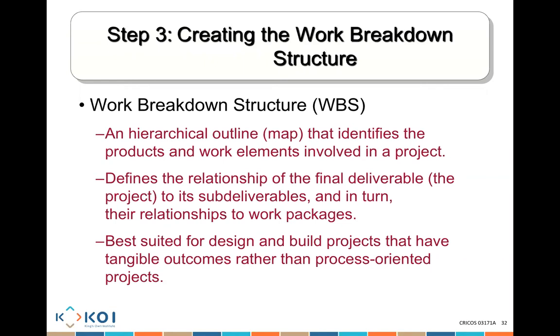When I give you the group assignment, it is very, very important that you create a very detailed work breakdown structure. It starts from high level and goes all the way to the detail. The reason why it's very important is because if you do not do that, you can't really estimate how much time is needed. You can't assign people to the resources. The two main things you need will be wrong. Your budget will be wrong. Your scheduling will be wrong.